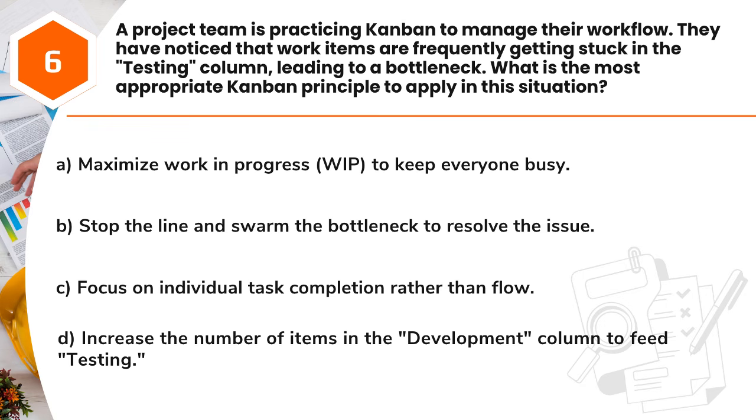A. Maximize work in progress, WIP, to keep everyone busy. B. Stop the line and swarm the bottleneck to resolve the issue. C. Focus on individual task completion rather than flow. D. Increase the number of items in the development column to feed testing.